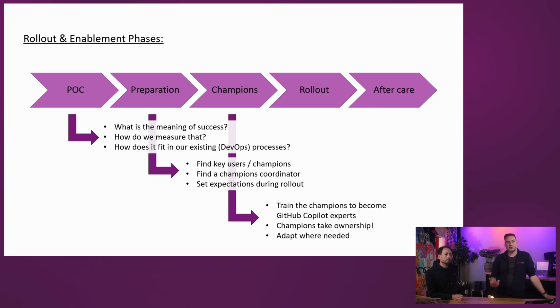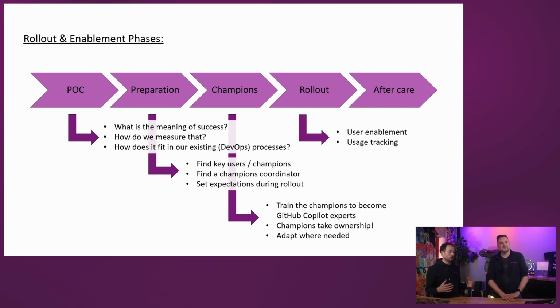Yeah. And that's also why that coordinator plays a part as well, right? So you need to almost approach this like a project. If you know that you need to train 300 people, then you need to make a schedule for that. You need to free up the champions from the day-to-day work so that they have the time available to start doing this. Reserve rooms. Find the cohorts of people you're going to train, because that also requires alignment with the different teams, with the different team leads on their availability. That's quite a challenge.